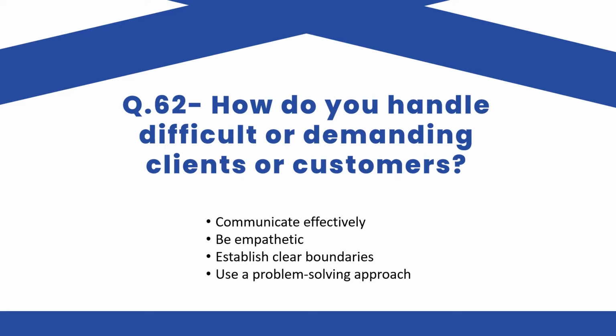This helps to build trust and establish a positive relationship. For example, if a client is requesting constant updates, create a schedule for regular progress reports that the client can rely on. Number two, be empathetic.